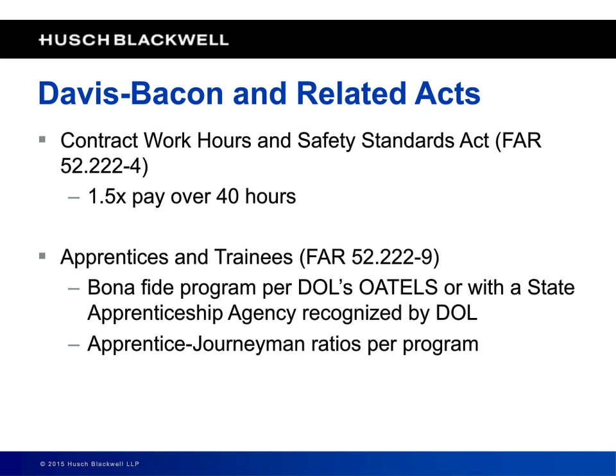Now, there's an issue that can arise here that I want to alert you to. Your work week, and again, you have to be paid weekly on Davis-Bacon Act jobs, the work week can be whatever you want it to be. And your subcontractor's work week can be whatever they want it to be.